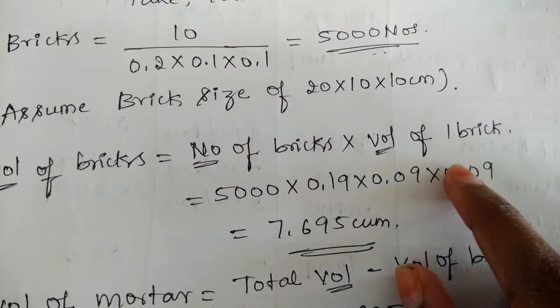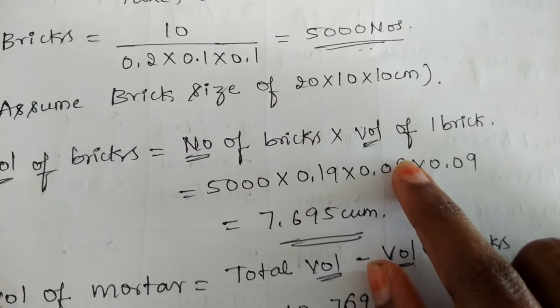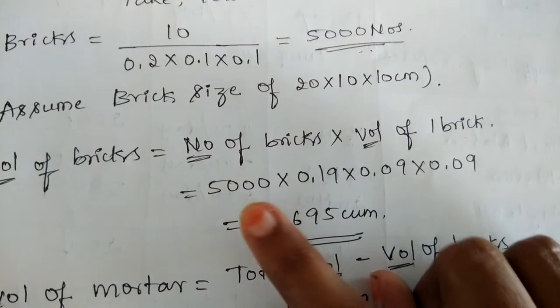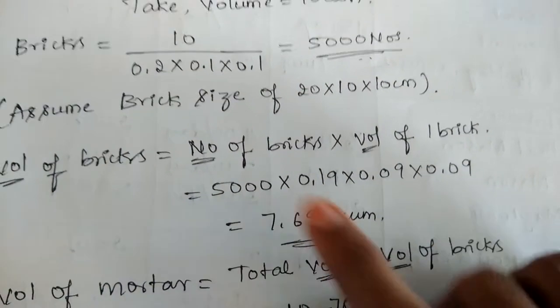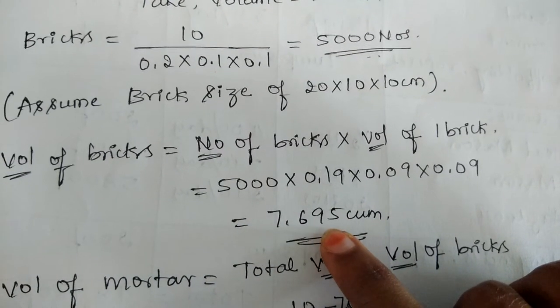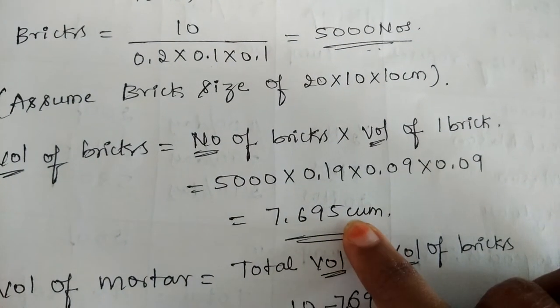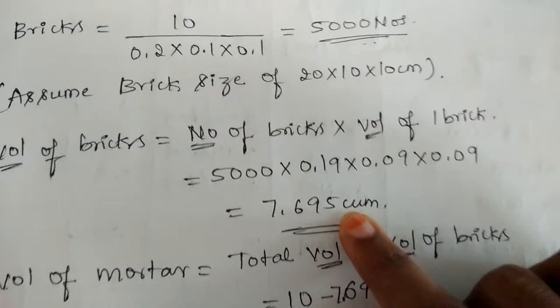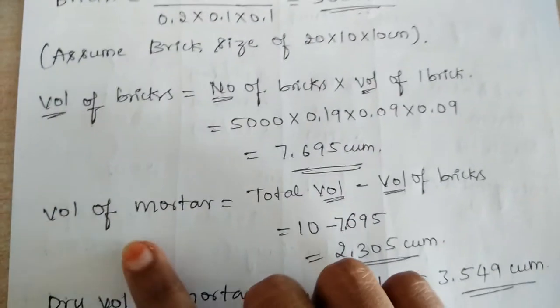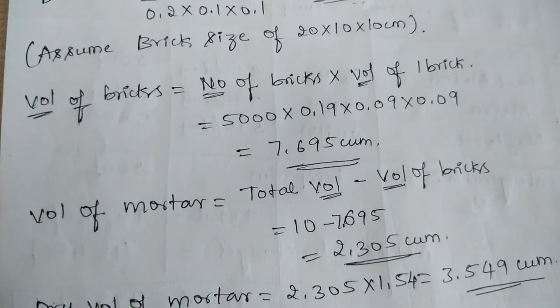This gives you the volume of one brick. On multiplying one brick volume with the number of bricks, we get the total volume of bricks which is 7.695 cubic meter. Now let us find the volume of mortar.